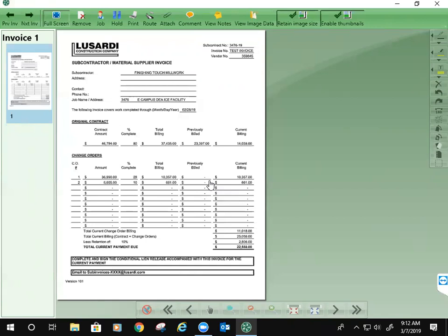So you're going to start seeing on the subcontract side billing forms that look just like this. We'll put in their exact subcontract number and their vendor number, the job number and the job name, and kick it out to them and specify to them some instructions that it's only authorized for them to email it in. That specific form is for that specific contract, especially for someone like Brian Cox Mechanical, who's maybe on 8 jobs. You're going to get 8 separate invoices, pre-populated, one for each active contract.